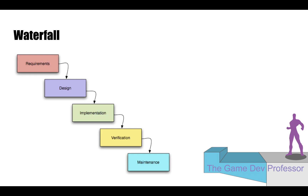To start off with waterfall: waterfall is a design theory that comes out of GE manufacturing. When you want to create a product — in this case a game — you write down all the requirements, you design it out, then you implement it, then you check it. It flows from one group of work to another. This is honestly how a lot of companies structure their contract projects, where there is a set of requirements set in stone from the beginning.